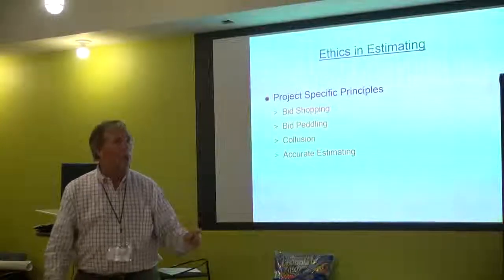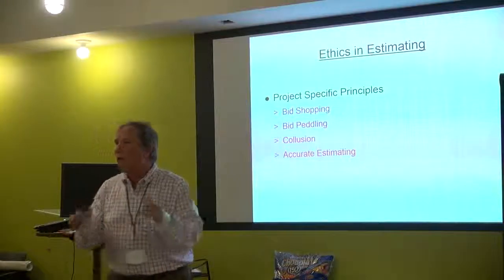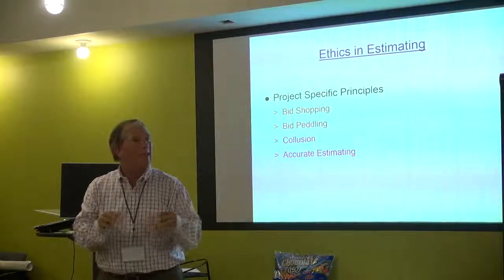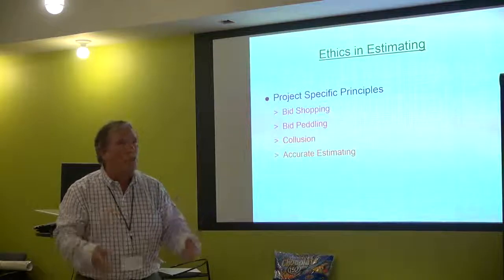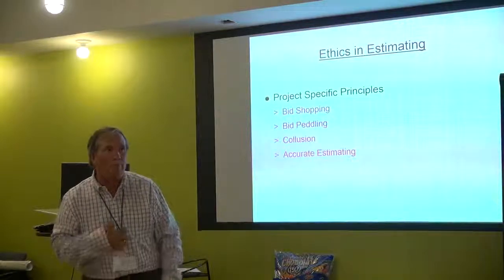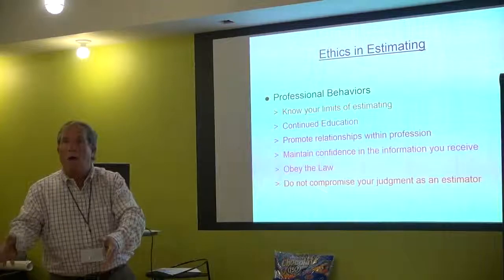You can't bid shop. Bid shopping is, I have a number, I'm going to go out and see if I can't beat that number. I'm going to find somebody else to do that number. No. I can't bid peddle. I can't find out that I wasn't the low bidder and now call up somebody else and say, well, you know, I could lower my price by $10,000 or something. I'm just peddling a bid.